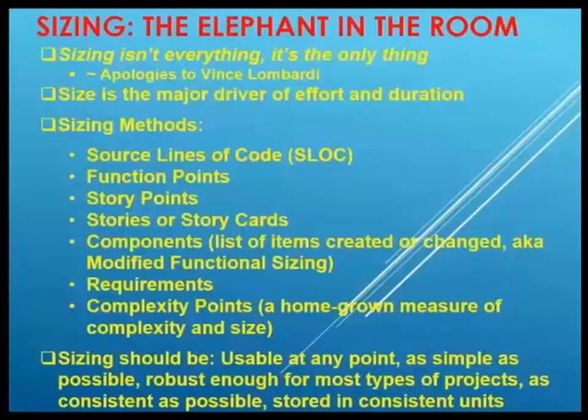Size is a major driver of duration and effort. And it can be based on a lot of different methods, a lot of different ways of determining size. It can be source lines of code, and that may not be quite as practical as it used to be, but it's still a sizing methodology, and it's kind of the basis for everything. Even if you're not even considering lines of code, it's still the lowest common denominator here.